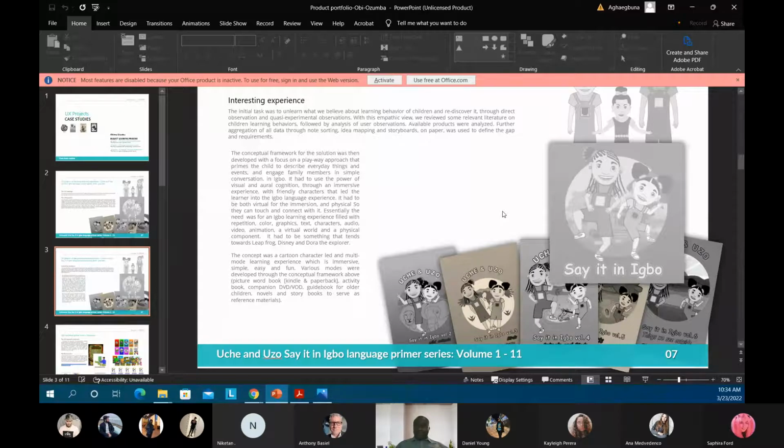And it wasn't really going the way it should until we stopped and went back to the drawing table and reevaluated the mission as a project mission statement, meaning we went back to normal practice, even a simple checklist, and put it on a project to draw a timeline, determine, delegate responsibilities and authorities and deliverables, milestones, and all of those, and then determine who should do what.